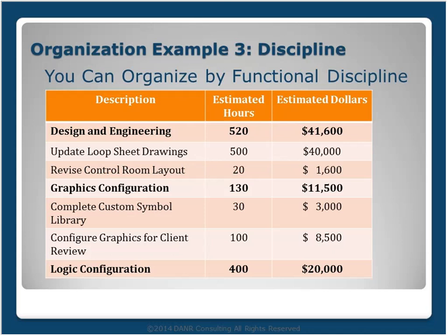And note that the point here isn't that any one of these approaches is the right approach. Really what I'm trying to communicate is that you should be giving thought to how you organize the FEL documents for your client so that what you're creating in the FEL is aligned with how you want to manage the project. And you can actually take the scope of work document and use it as your guide through the project. You can take the estimate and use it as your budget during the project. And you can take the schedule and use it as your schedule when you're actually doing the project.